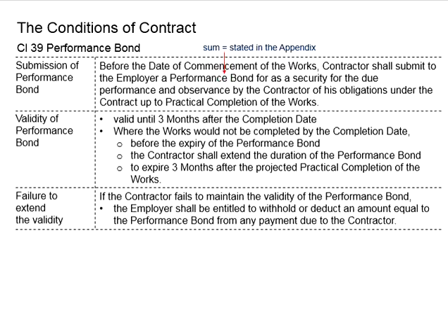Knowing the contractor does not actually extend the duration of the performance bond, the employer can withhold or deduct any amount that is supposed to be paid to the contractor during interim claim in order to salvage an equal amount for this performance bond. It is so that the mechanism to safeguard the employer still applies.